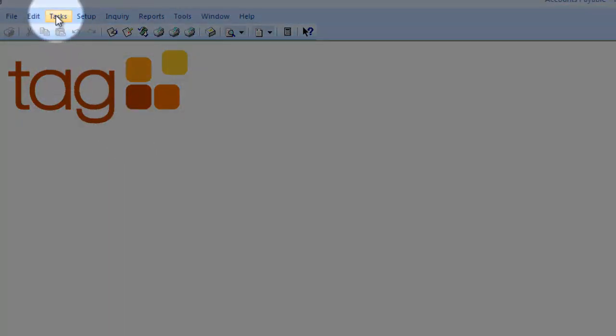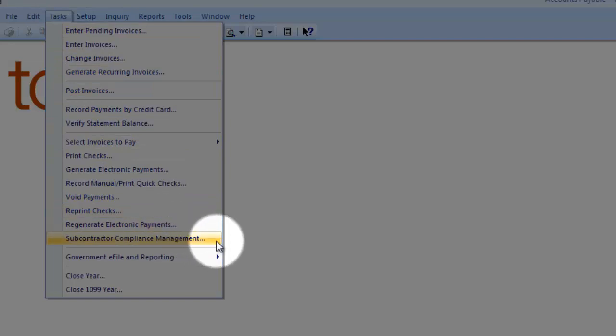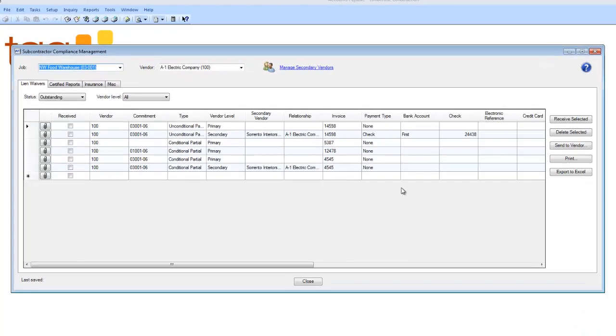To get to the Subcontractor Compliance Hub, I can access it from two modules. I can access it from Accounts Payable or Project Management. To do so, I hit Tasks, Subcontractor Compliance Management. Inside, I will see a hub.